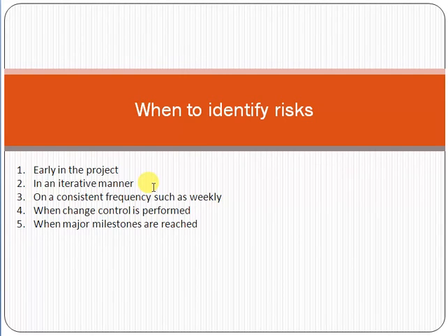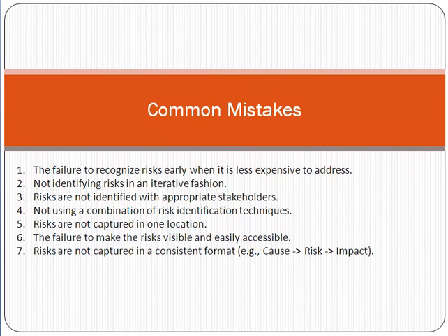Whenever any major milestone is reached, or any major change has been made in a project, you must identify the risk. Friend, a very common mistake when identifying risk is that at a very early stage, we don't identify the risk. When the project has started and we reach the middle of the project, then we identify the risk. At that level, risk is not a risk, it will become an issue.